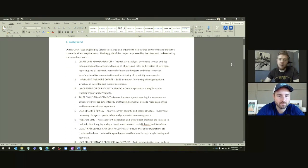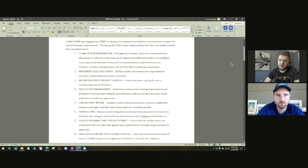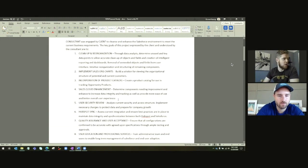Yep. But what I found myself, and we can touch on this as we go, what I found myself doing is trying to itemize things, at least with the services, as granular as I could, so that if he were to say, listen, we don't need all this work done now, we'll do some of this work later, he can pick out those things, but what's left is the real meat and potatoes of the project, stuff that would make me the most money and really have the most hours involved.